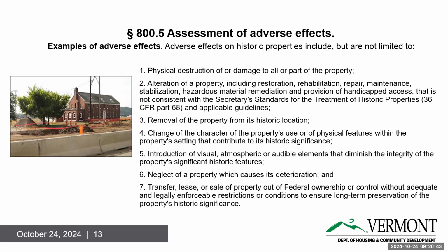We have to go to the National Register of Historic Places, justify why it needs to be moved outside of the boundaries, what integrity it will retain. So for example, we did the New Haven Depot where we picked it up and moved that in cooperation with VTrans. We had to notify the National Register why it was being moved because it was so close. We had to really justify that it needed to be relocated for the safety of the Amtrak, the riders of the trains, the drivers on the road right there, and also the building itself.